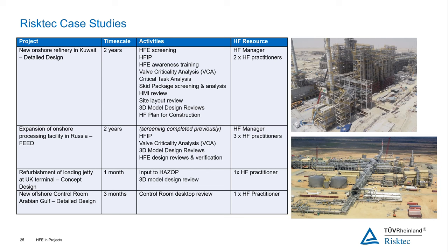So one was a refurbishment of a loading jetty in the UK. For that one, our input was limited to taking part in HAZOPs and doing a 3D model design review. So for that one, there wasn't a need to produce a specific HF plan, and there was just one person that could provide that input. And similarly for the one at the bottom, a control room desktop review. So it's a more limited project, and one person could do that. And so each project will differ,